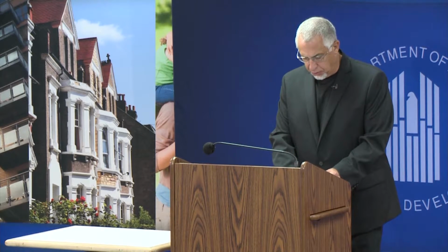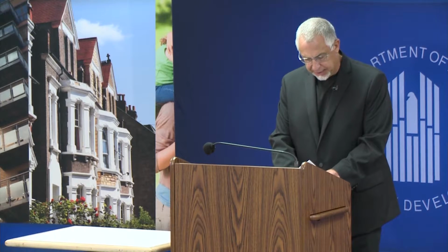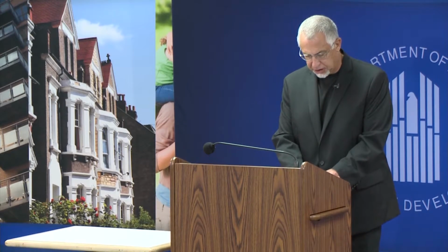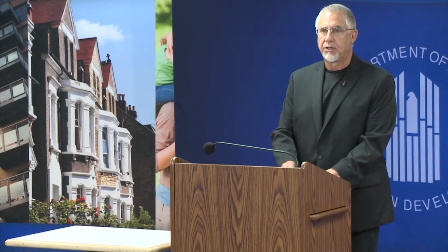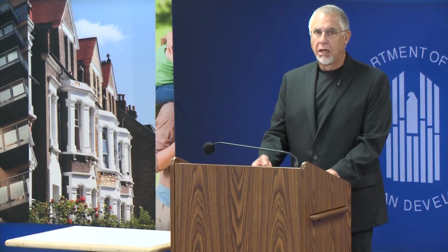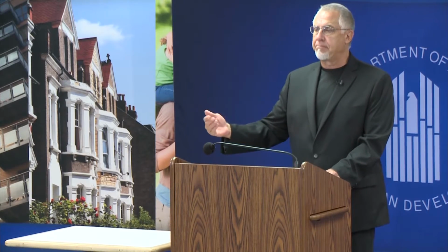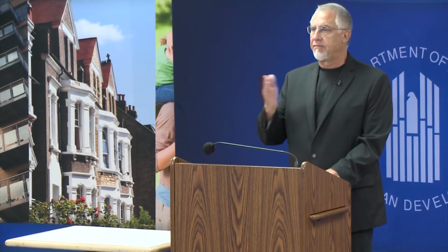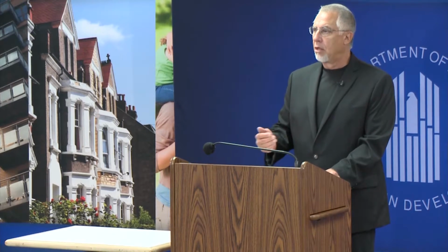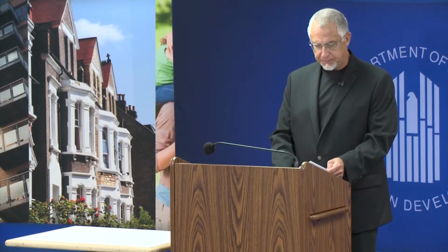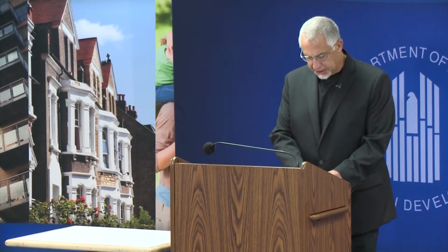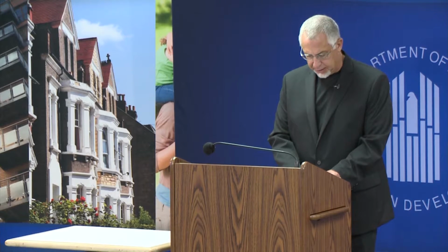And also, the second sentence, to the extent practical, the non-federal entity must distribute micro-purchases equitably among qualified suppliers. So although we're not doing a competitive process here, we are making that business funded with federal funds available by rotating the purchases to qualified suppliers. But it's not telling us what the dollar amount here is for micro purchases.